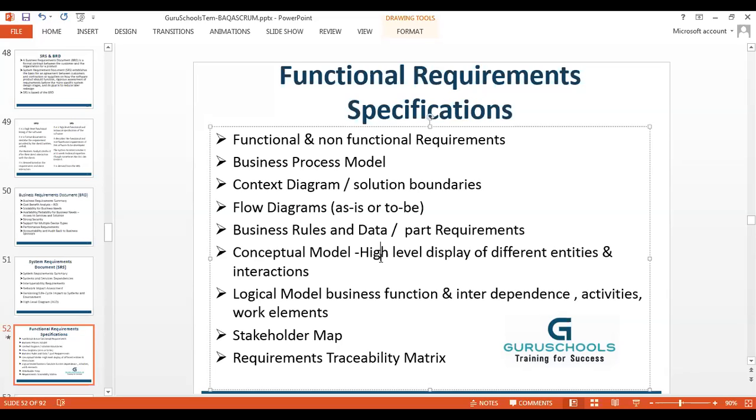Okay. And then stakeholder map. We don't have a stakeholder map in SRS because we don't know what the team will be, right? So the stakeholder map is the responsibility of the overall PM, project manager. So this is normally owned by the project manager or solution architect, depending on the project team forming. Team hierarchy is defined by the senior management for a particular team, particular domain, and so on and so forth.